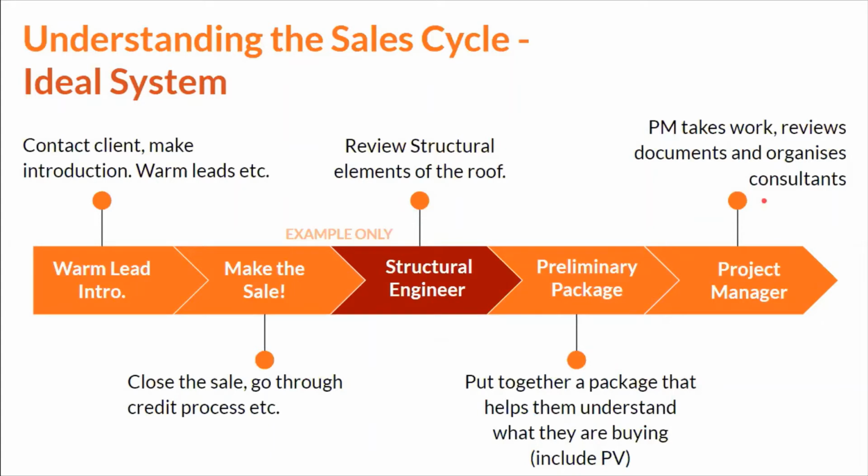The truth is, once they get the project and they're trying to make it work, the last thing that they need is to hear about them having to find new areas and different considerations to make it work, because we came in right at the end when they were ready to install and said, your corner zones have got too much wind pressure.